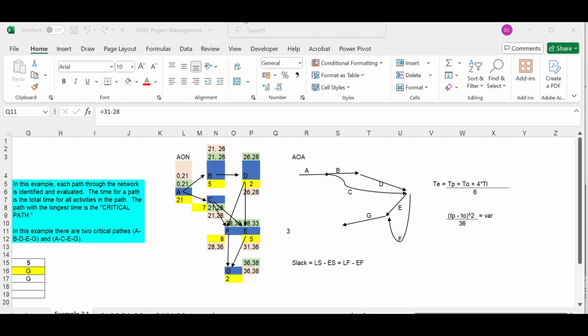Crucial activities involved in the project time management process are defining activities, sequencing activities, estimating activity resources, estimating the duration of activities, and developing the schedule. Now, these activities that I mentioned are to be done in the planning phase. There is another activity called controlling the schedule that is to be done in the monitoring and controlling phase.